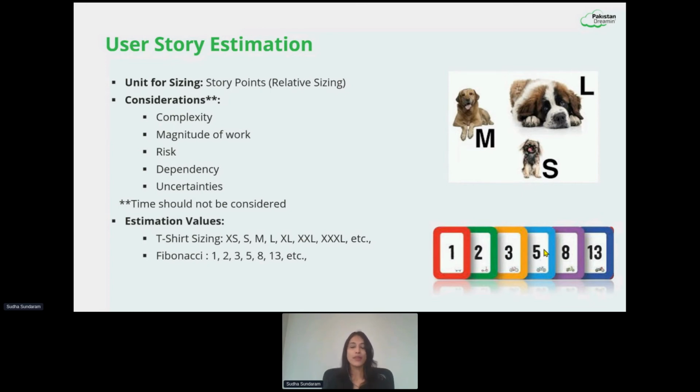So, for example, again a Salesforce example: we are trying to capture a new field in Salesforce, some new information, right? Let's take the account level itself. If we are doing the account level story, and I'm going to estimate story points for that as a team, the first thing we have to think is, how much is this story in complexity? How bigger or smaller is the complexity in comparison to my field label change story that I did in the past, right?